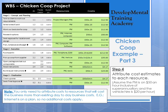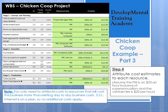From there, you attribute cost estimates to each resource. For example, if you assume the project manager is on $50 an hour inclusive of superannuation and vehicle hire is $20 an hour, you can start to work out costs. For task 1.1, the project manager is going to cost $12.50; task 1.2 is also $12.50, because that is a quarter of an hour and a quarter of $50 is $12.50. Some items in your resources list may not have costs attributed to them because your organisation might have those as fixed costs — for example, your office space or internet, which are paid on a contract basis regardless of whether you have this project or not.